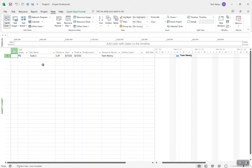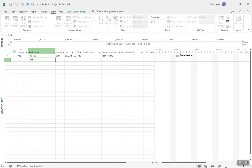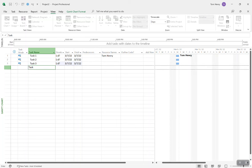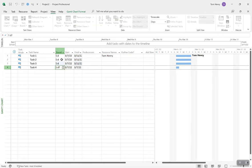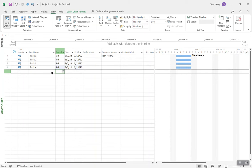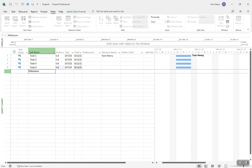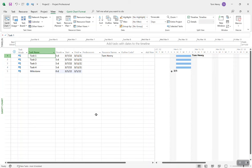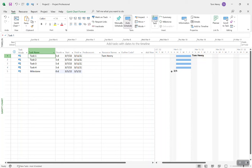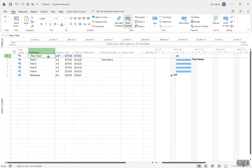We're now set up to get started on our project. That was a lot of setup, but it's going to be handy. So we've got Task 1 — let's add Task 2, Task 3, Task 4. Give them a duration of five days each. We also want to create milestones — these are the building blocks of any schedule. Let me put a summary task in here; we'll call this Phase 1. To make a task into a summary task, you indent the tasks beneath it using the indent tool in the Task ribbon.